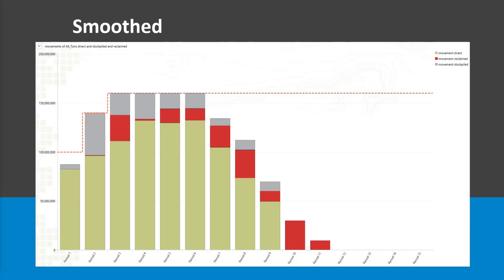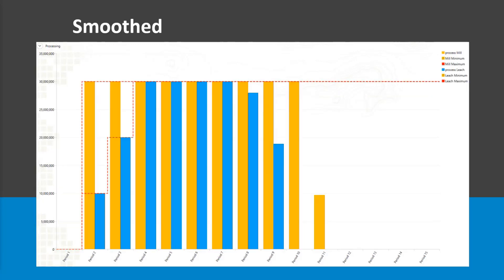It's a slightly shorter mine life, but notice we still get up to the same 160 million max mining — we just do it over three years. We've also pre-stripped a whole lot more in that first year, which although brings costs forward, it also makes it much easier to have ore exposed when the mill comes active in year two. For processing, I'm still buying the 30 million ton mill from the start. We slightly buy up three different leach units — it goes consistently high and then tapers off, whereas before the leach was the one going up and down.